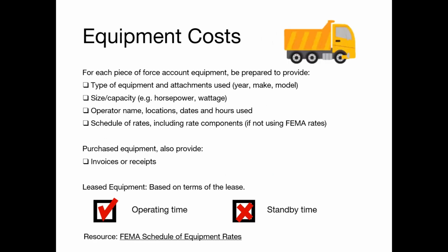FEMA provides PA funding for the use of applicant-owned equipment, also known as force account equipment, based on hourly rates. If an applicant does not have sufficient equipment to effectively respond to the event, FEMA may provide funding for the purchase of equipment and the use of the equipment based on hourly rates.